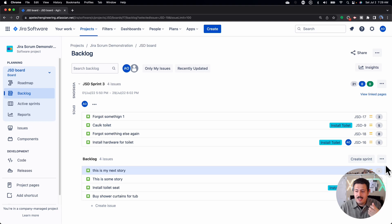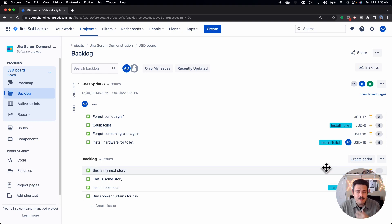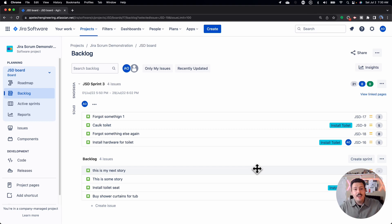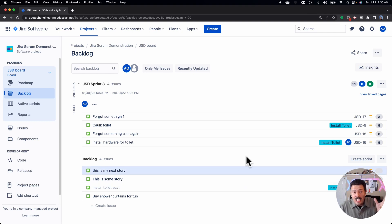The priority is like a medium or a low, which basically means there is no urgency here and there's no release — this fire that you claim to be a fire isn't tied to any deliverable. You want to use those three — the priority, the release, and the epics — to convey that urgency and importance.